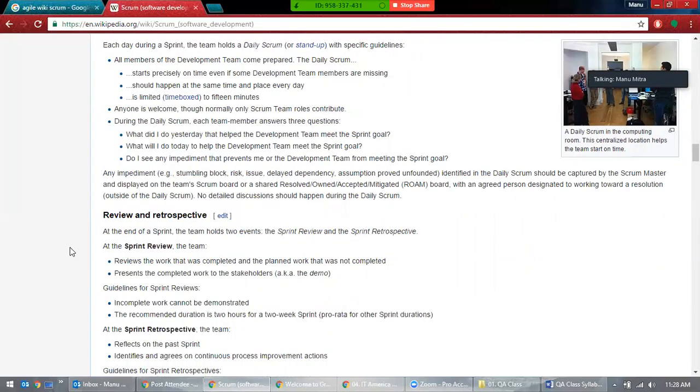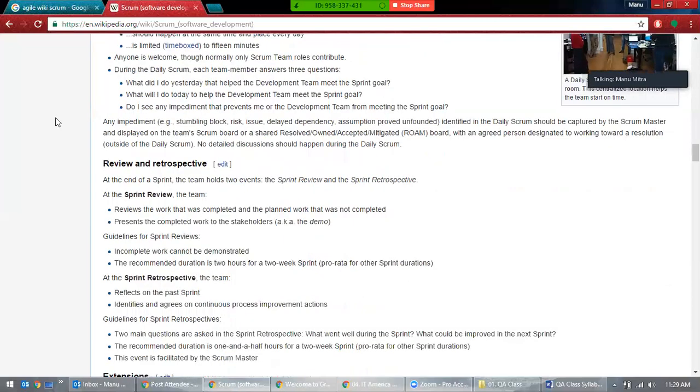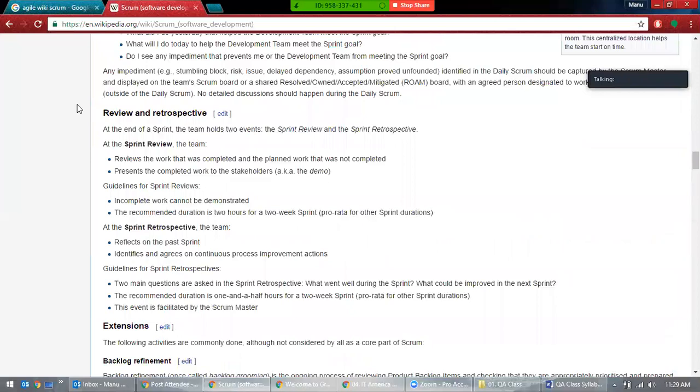So next we will discuss the review and retrospective meeting. What do you discuss in this? You discuss what went good, what didn't go good, and how can we improve on what didn't go good. These 3 things are important. We need to keep improving in Agile: how easily we can fix the issues, and how easily we can make the work easy for everyone.